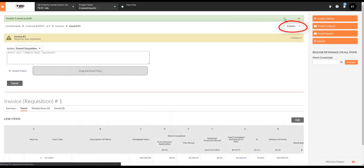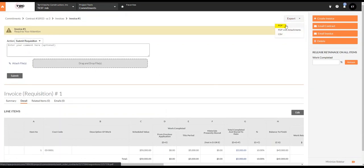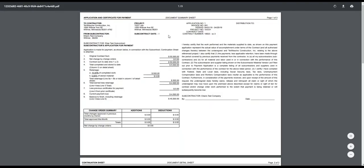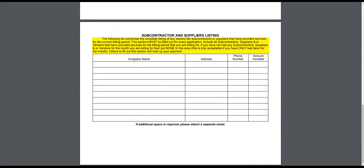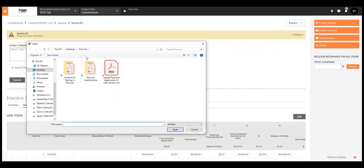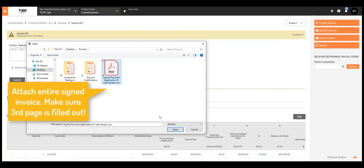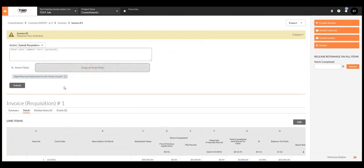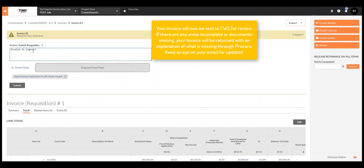You will now see the finished draft of the invoice you just created, so now we'll need to sign it. Hit Export to PDF and there should be three pages for you to print out. Sign the first page and on the third page list any vendors that you purchased materials from this period — this page needs to be filled out every pay application. Once you've signed everything and filled out that materials vendors list, go back to your saved draft invoice and attach the signed invoice. You can even add a message saying the invoice is signed and vendor list is filled out.